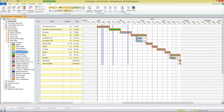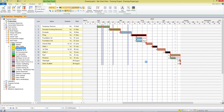And if there were a couple of things that I needed ACME Builders to do, I can multiple select various activities and allocate that code to all of those tasks, saving a little bit of time. Once we've allocated the codes to our project, it's very easy to use these codes to control the output.